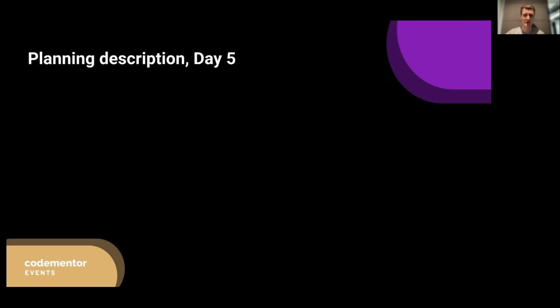Day 5 is empty. I specifically didn't fill in any information here because on this day everything should be settled, everything should already be done, and it's also a resource reserve. Sometimes people have sick leaves or other unplanned, unscheduled activities. And during this day, you need to finalize what needs to be done, or help your teammates to fulfill or plan their work accordingly, or even do this for another sub-team if the other sub-team lead or a more senior professional in this team for some reason could not do this.